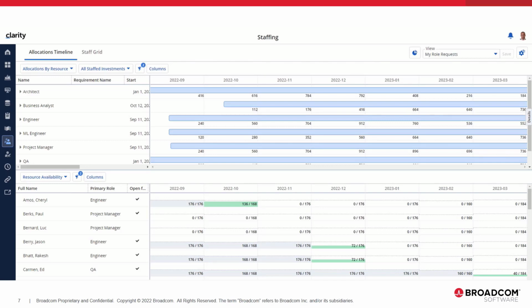Before Ray changes this setting, let's take a look at how he has configured his page for managing role requests. A saved view has been created based on how Ray's company processes role requests. When a project manager wants to staff a project, a role is staffed and assigned to tasks on the project. The requested manager field is filled out with a resource manager on the staffed role.